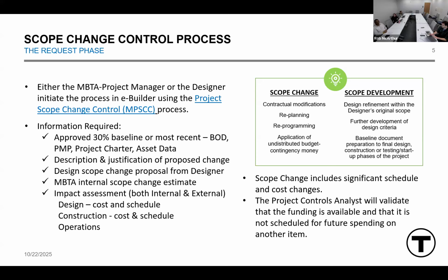So the difference between the scope change and scope development is highlighted in that box. Scope change includes contractual modifications, replanning, reprogramming, and application of undistributed budget and contingency money. Scope development, on the other hand, is design refinement within the designer's original scope, further development of design criteria, or baseline document preparation to final design, construction, or testing startup phases of the project.